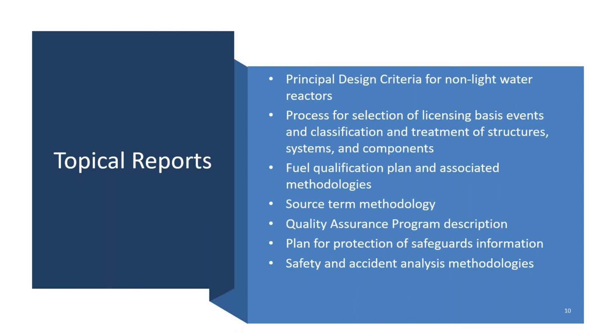On the next topic, for fuel, applicants need to be able to demonstrate that your fuel is qualified for use in your chosen reactor design or your proposed reactor design. Pre-application engagement on this area should include staff approval of the fuel qualification plan and associated methodologies, potential staff observation of the execution of the testing, and verification of the results of the testing to support qualification of the fuel.